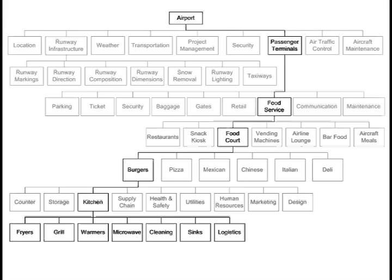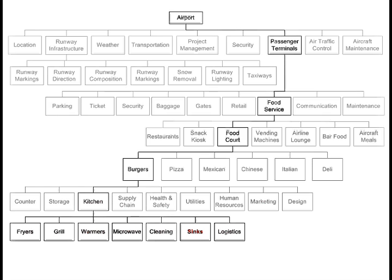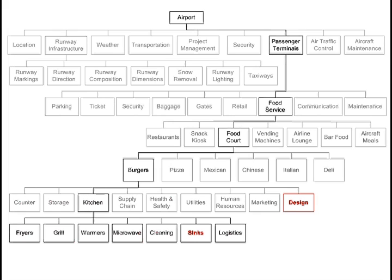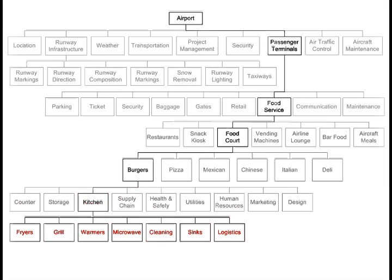The lowest level of WBS decomposition is called a work package. Think of a work package as a deliverable that is decomposed to a level where you can comprehend all of the tasks necessary to create that deliverable. At this level, you should be able to identify, estimate, schedule, monitor, and control all the activities necessary to build the work package. The sinks deliverable is at a work package level — I can sit down and come up with all the activities I must perform to achieve it, especially since the restaurant design is already completed and I know the dimensions and placement of the sinks.